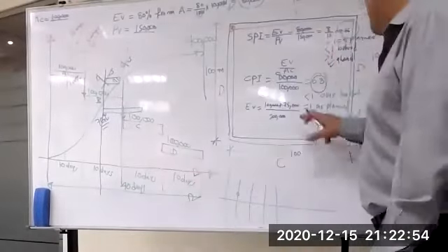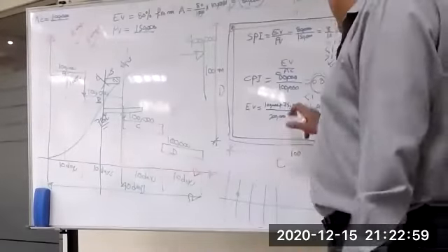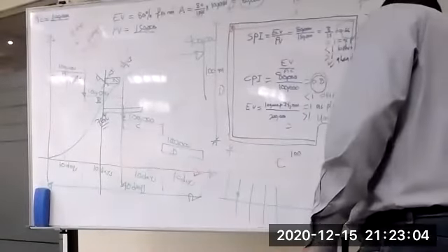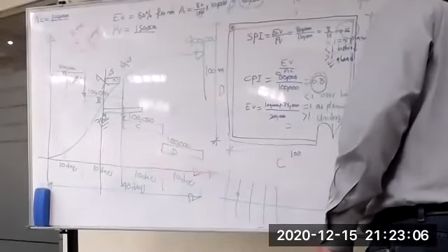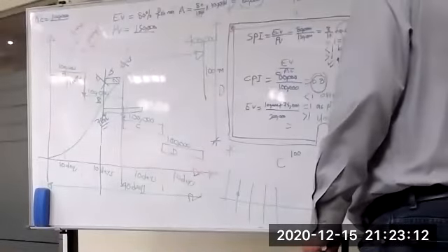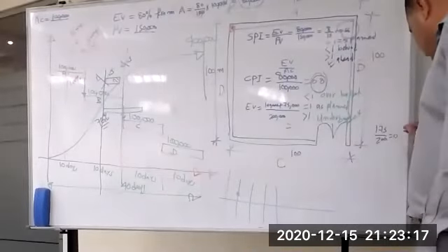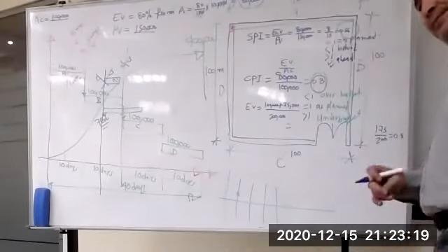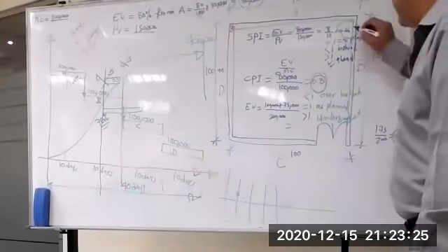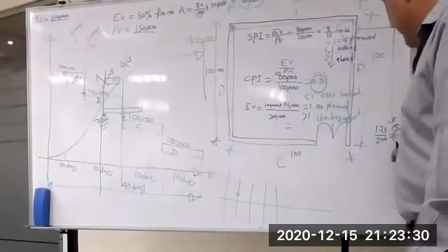Now, is your SPI improved or not? How much is this one? 175 divided by 200 equals 0.7 something. You see 0.75 or 0.8. Well, almost 0.8. This figure and this figure, what do you see now? 0.56 and 0.8.